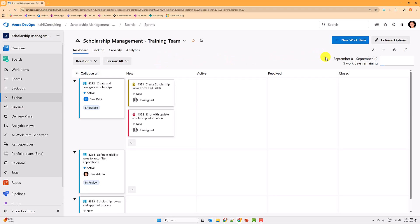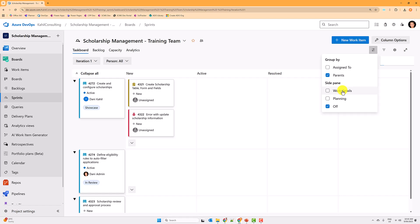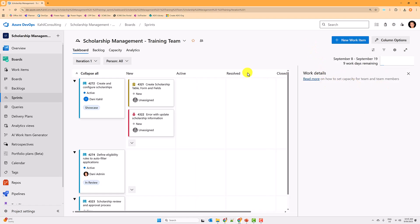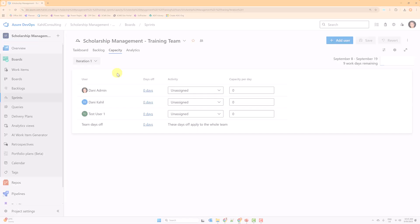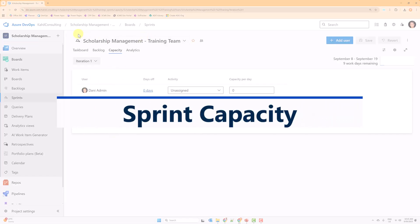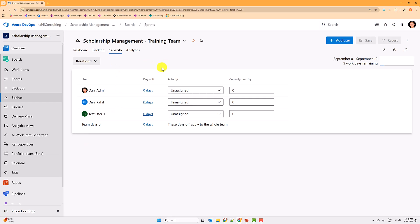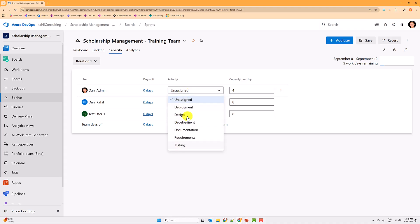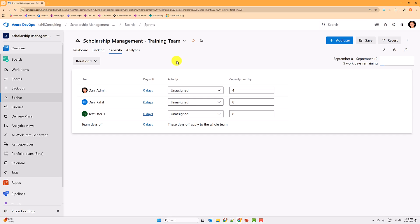Another feature on the sprint board is Work Details. If I toggle that, I can see the capacity of my team. Any users part of that team and project will be shown here, and you can specify days they're off so the capacity during the sprint is affected. I want to specify capacity per day in hours — the admin works four hours per day, and the other two users work eight each. You can even specify the type of activity.